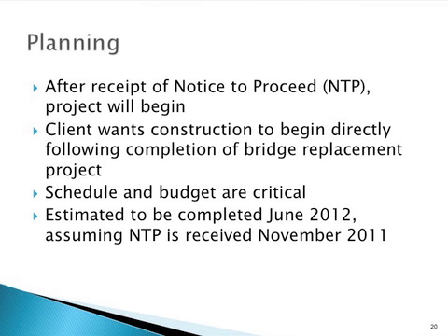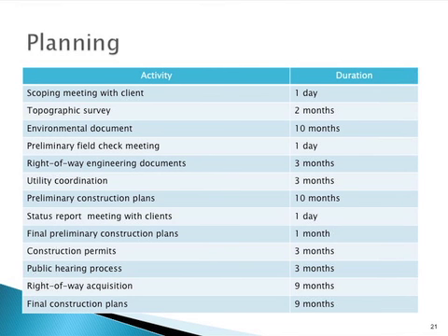After receipt of the notice to proceed from the State Department of Transportation and the local public agency, the project will begin. The client wants construction to begin directly following the completion of the bridge replacement project, since the trail will be integrated with the new bridge. Remaining on schedule and within budget is critical in execution of this project. Our project is estimated to be completed in June 2012, assuming the notice to proceed is received in November 2010. The next slide shows the schedule for the project, including durations.